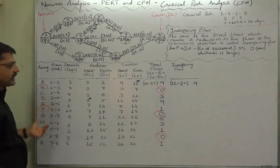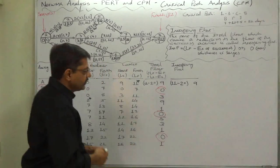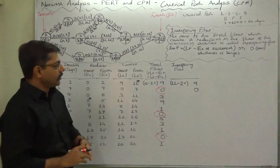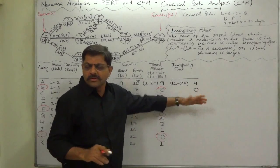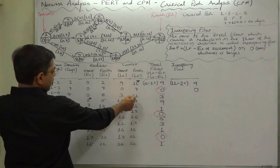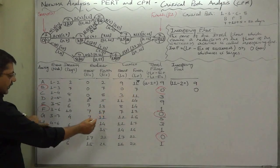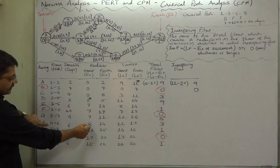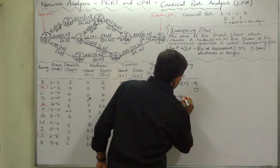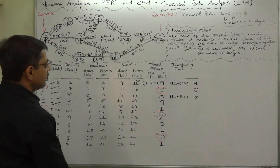In case of B, B is a critical activity, so its total float is 0. All components of total float must be 0, so we are not going to write anything, or if you write 0, it is also correct. C: latest finish time is 11. Successor of C is H, and earliest start time of H is 8. 11 minus 8, that is 3.